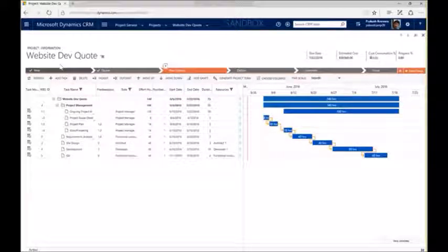I didn't have to do it this way. I could have just keyed in some roles and some rates, or inherited the rates from my price list. But in this case, I really wanted to break it down in a little more detail and use these tasks to build up my estimate. So as soon as I go into the WBS, you'll see a normal look and feel for a work breakdown structure. I have my list of tasks over here on the left-hand panel.